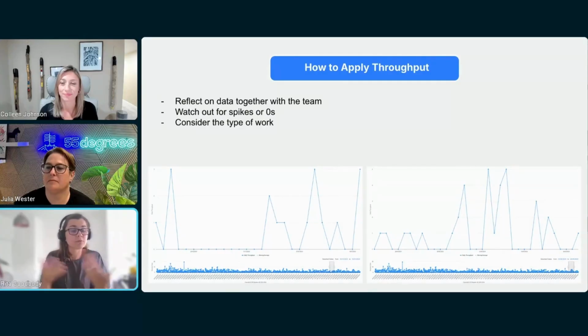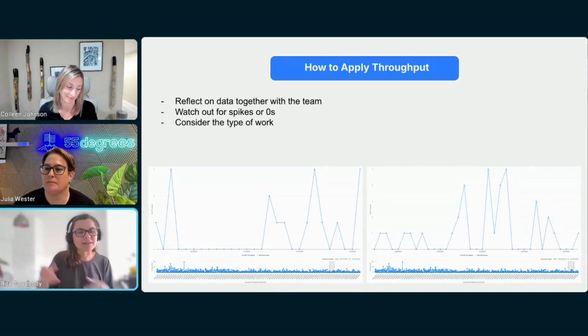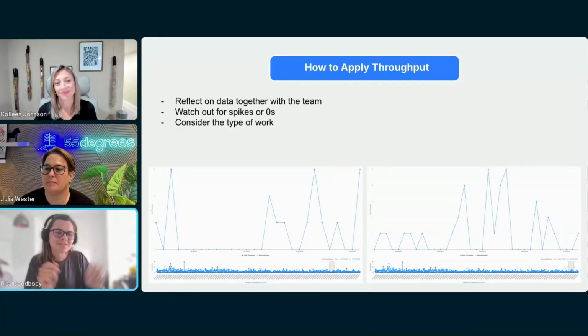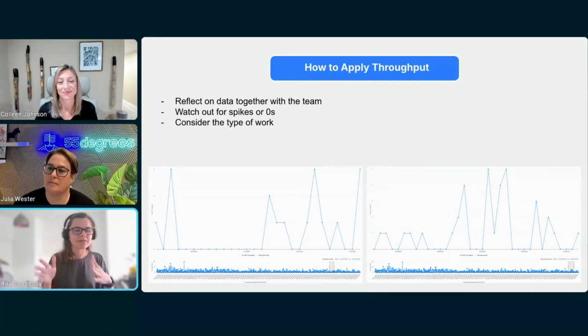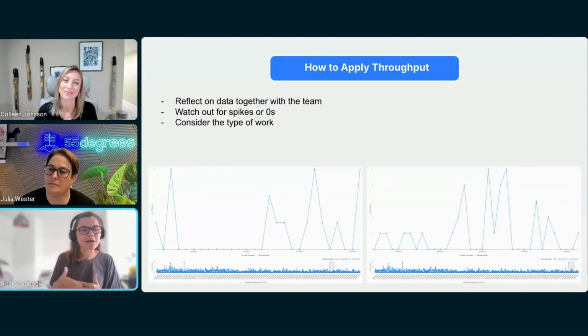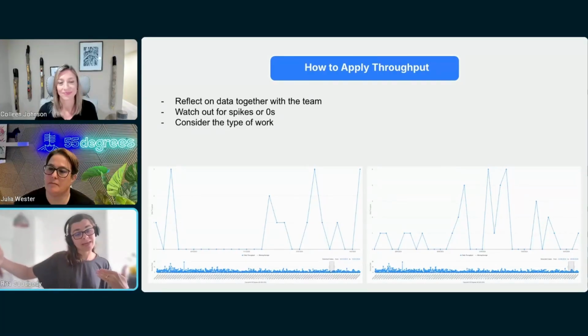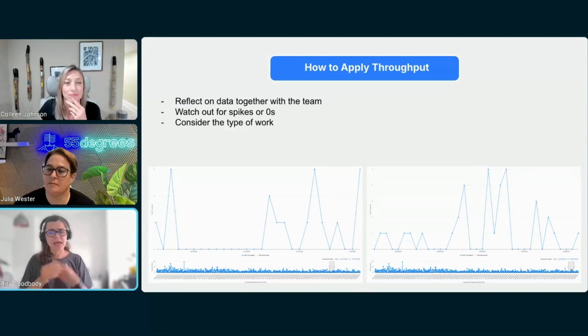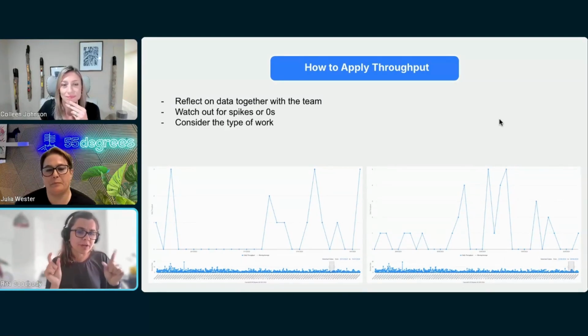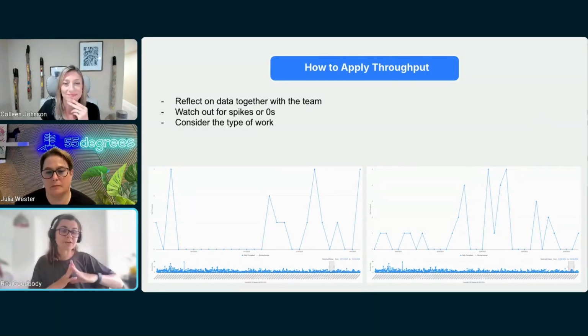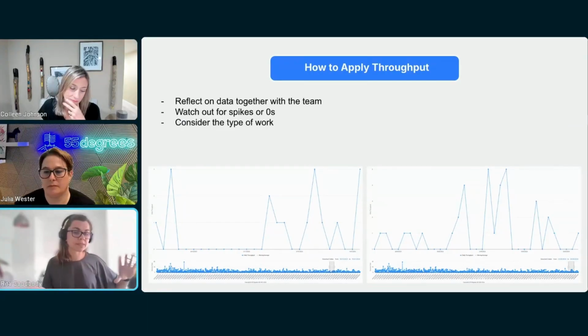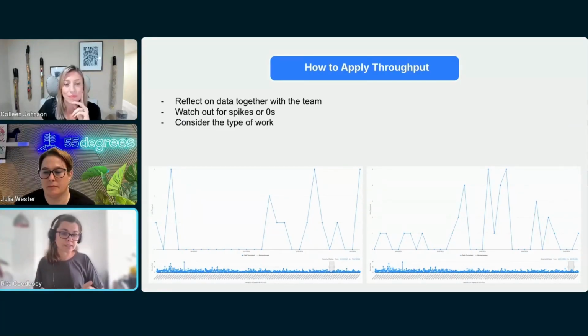But it wouldn't have been possible if we believed in our estimates, because we always think we can finish things sooner, but then somebody comes in with a quick 5 minutes thing: can you just fix this thing for me? And you're like, oh, I've just done 20 quick fixes, but that means you're not working on the actual things that you need to work on. So we also introduced 20 minutes before retro where we look at our data. We reflect on how the past 4 weeks went, what's happening, any surprises, what do you think?